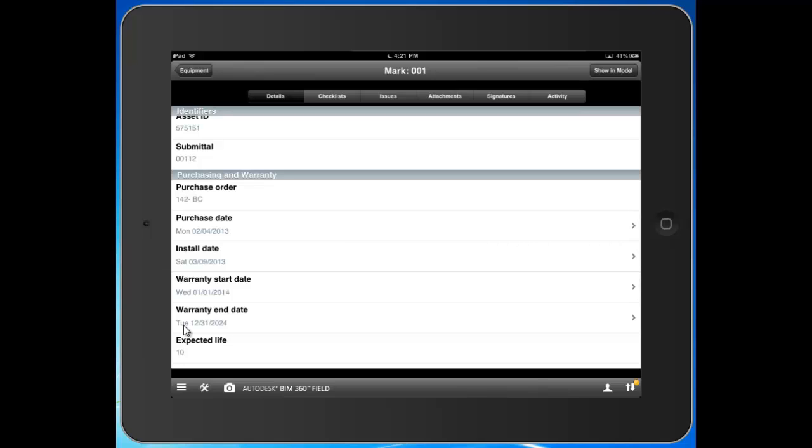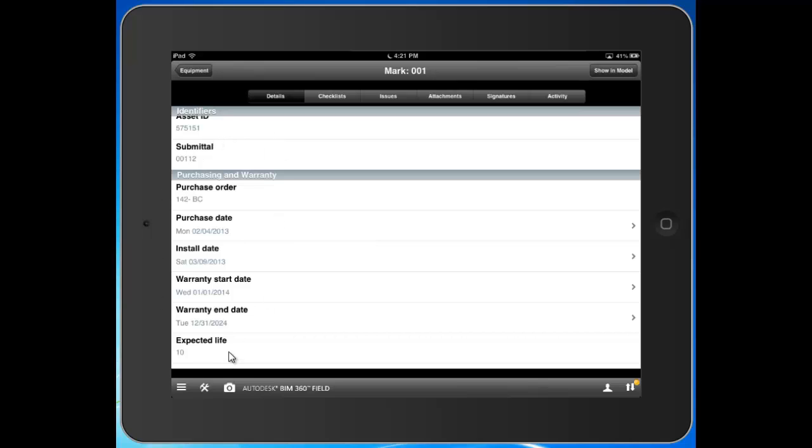One thing that I have seen is you're certainly not going to expect your field user from the iPad to put in the purchase order, the purchase date. But there are certain data points here that you would expect your field user to put in. For example, the install date. Whether it's put in from the iPad or from the web, you'll see that information here. The point is, as long as it's all populated either from the iPad or from the web, it's working on the same wavelength. And it's going to be a lot easier to hand over this data to your owner.